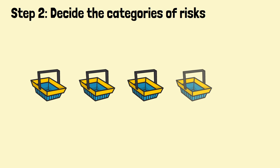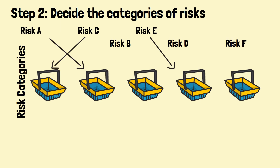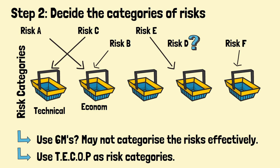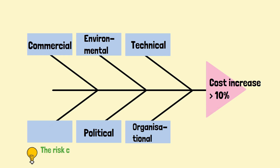Step 2: Decide the categories of risks. The participants will need to brainstorm the categories of risks. The categories should be able to contain most of the risks identified. We can use the default 6M categories, but they may not be effective for risk categorisation. The more appropriate categories could be based on the T-COP classes, which are made up of technical, economical or environmental, commercial, organisational, and political. Let's look at how our fishbone diagram looks like now. By the way, the team has the freedom to define their own risk categories.